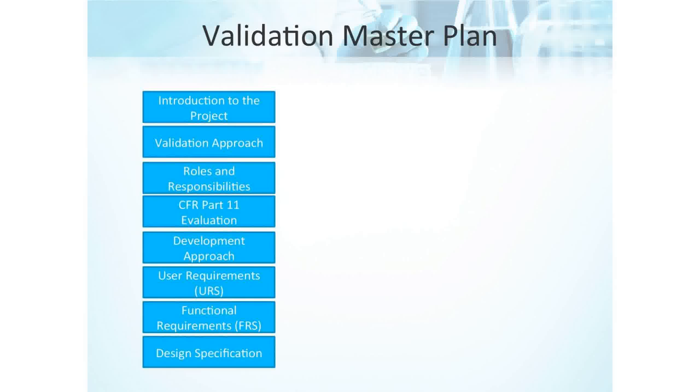Yeah, thanks. And then the validation approach section. And this will describe the steps that we'll use for completing the project. Building on the previous example, let's assume that it's an upgrade requiring installation and testing of software for the development area. So you're going to have to install it on the dev instance, on the val instance, and then in production. That's pretty normal. Yeah, that's pretty normal. However, let's assume that system then interfaces with and feeds data to 3 other systems. So you've got a system with validated data that's going to feed 3 others, and maybe the users can log on to Citrix.